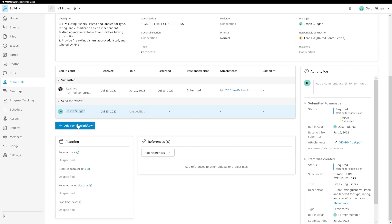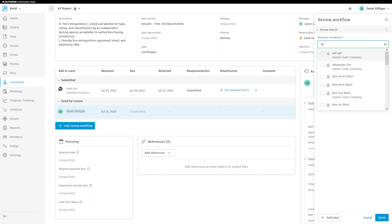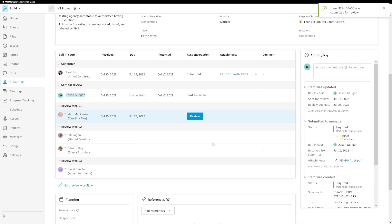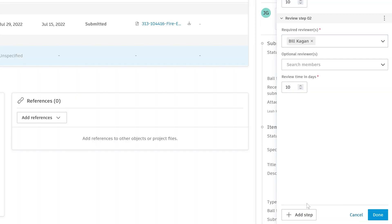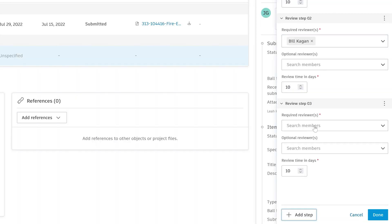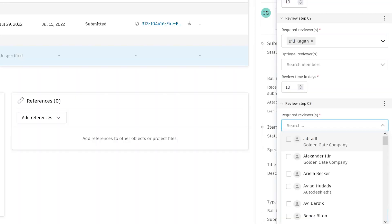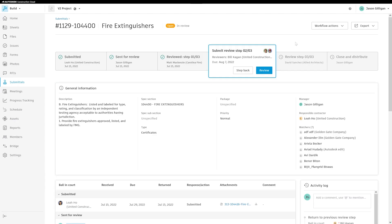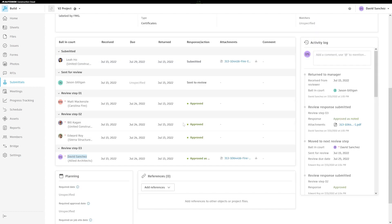Now, submittal managers can customize their workflow in the submittals tool to reflect the specific process on their projects. They can add multiple steps and reviewers, set a final response, and close or create submittal item revisions at any step in the workflow, helping to reduce miscommunication and keep project stakeholders up to date.